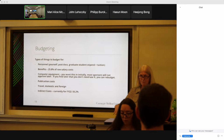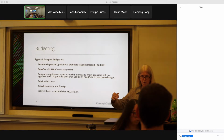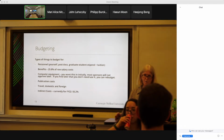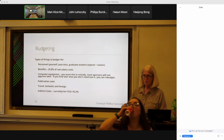If you're going in at 200,000, your plan A is full-fledged: these are all the goals you're doing. But if you really have to cut back, you need to think about B and C. If you get cut to 75% or cut down to 50%, what are you going to give away? Because you do have to justify exactly what you're going to cut out of that budget to go back down to 100,000.